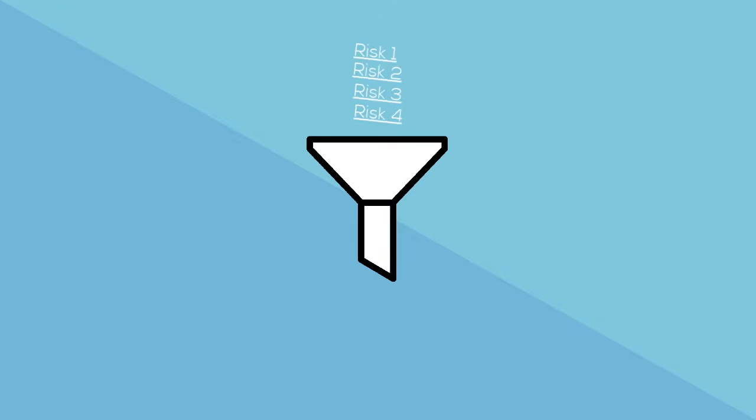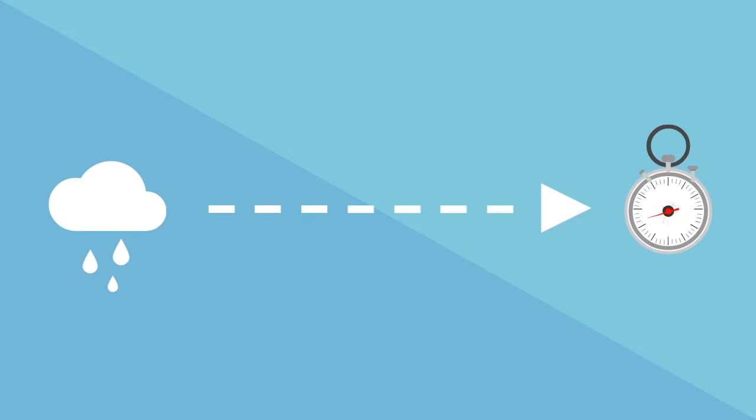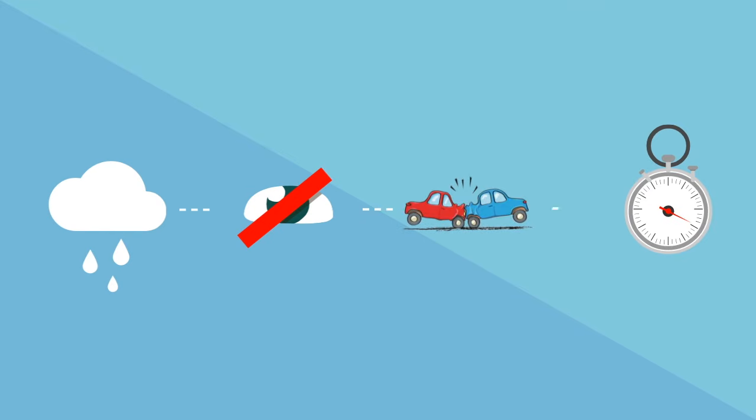Filter out the risks that are objectives and pick their causes as the risks. Ask yourself if the risk has a direct negative effect on the objective. Identify follow-up events that will eventually lead to affecting the objective. The event that has a direct effect on the objective will be your risk.